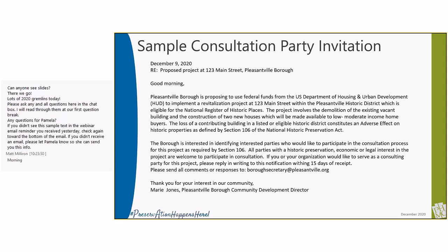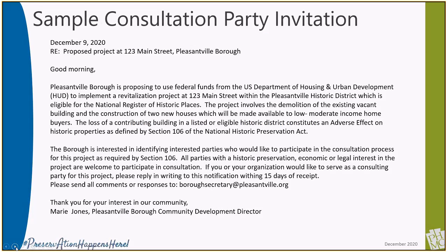If you need help identifying historic preservation interests in your community, you can contact the SHPO, as we maintain a list of such organizations by region and can offer suggestions as to which local preservation interests should be contacted to participate in consultation. Be sure to request a response in writing within a set time period. You should allow at least 15 days for a response to the solicitation. Retain a copy of the response or lack of a response for your files.